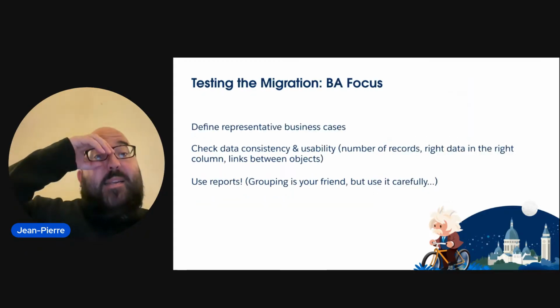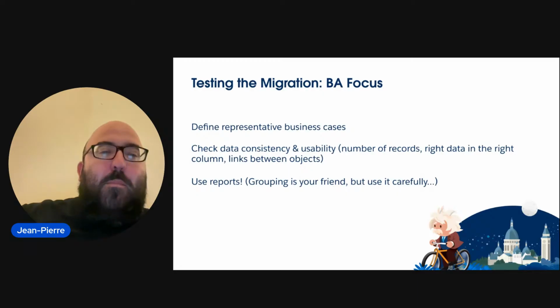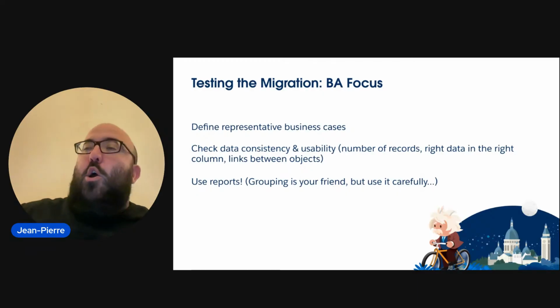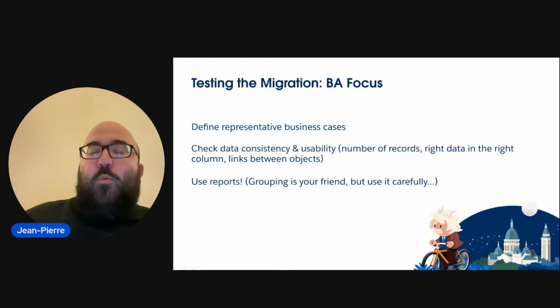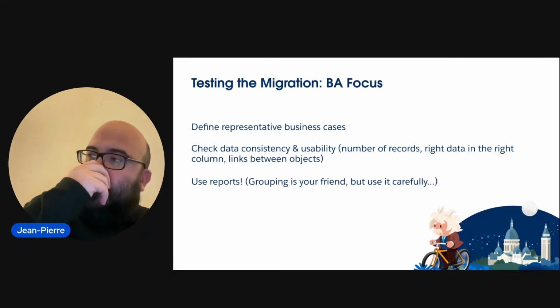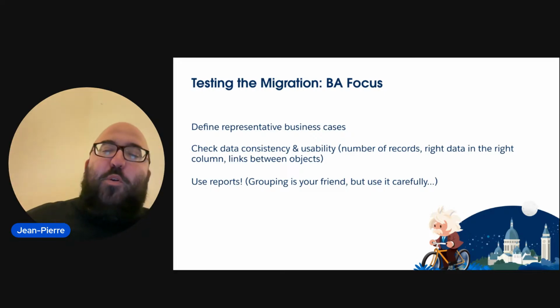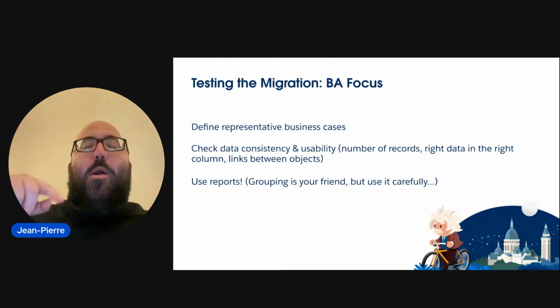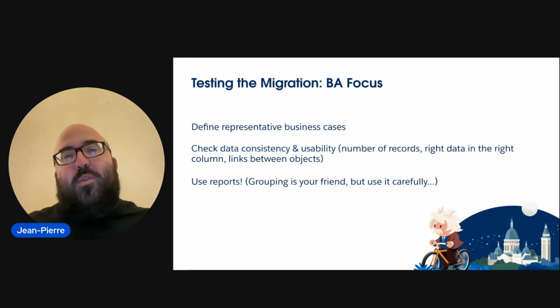Okay, so testing the migration. As I said, I want to come back to that because it's very important as a BA to understand that you need to define business cases that are representative of the everyday job. You want to make sure that the data you're importing is working in the context of the feature, or the other way around, that the feature you have built is working in the context of the data you're importing.